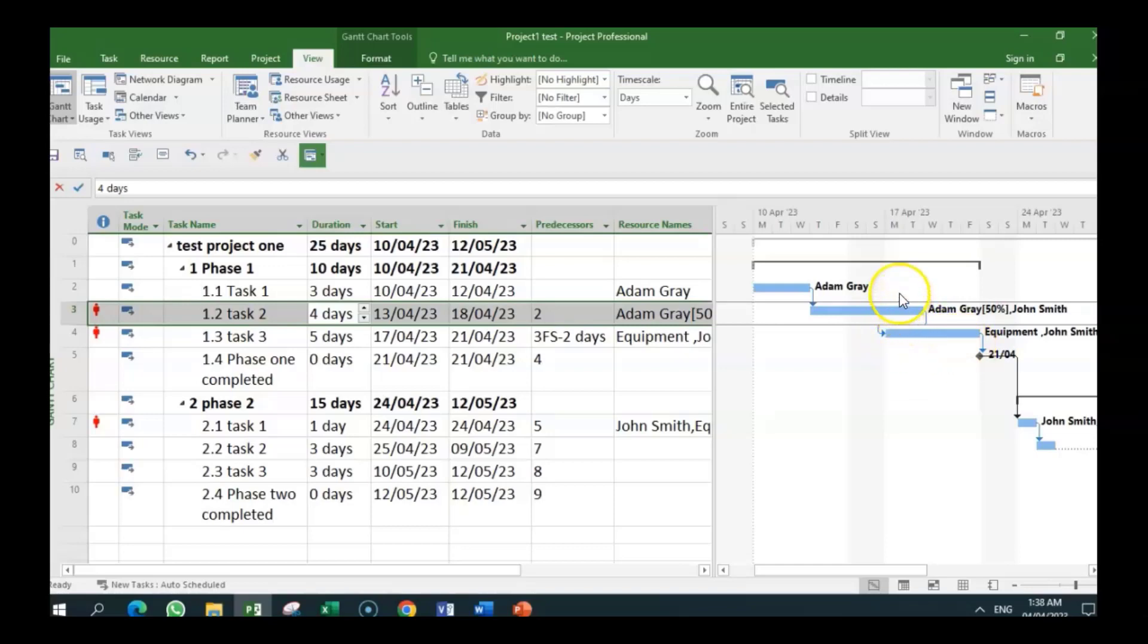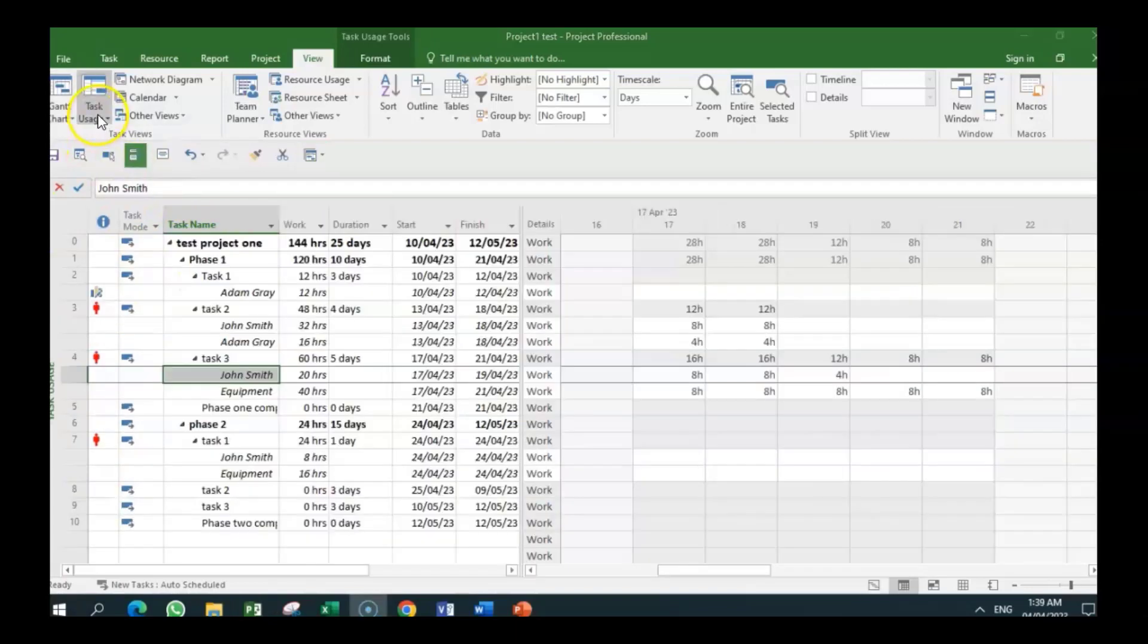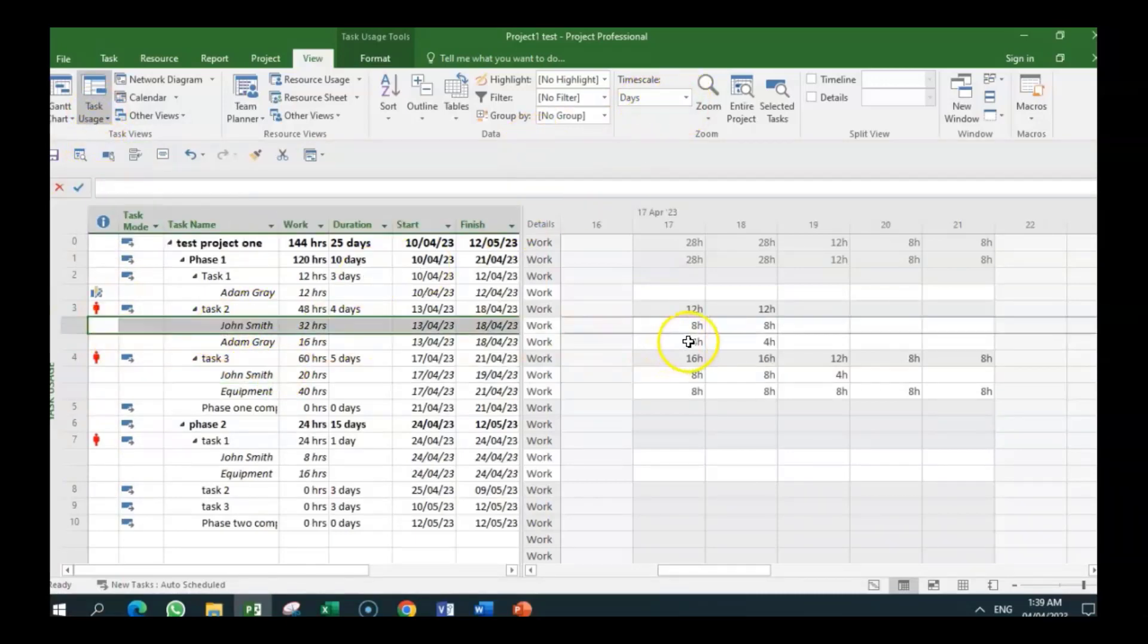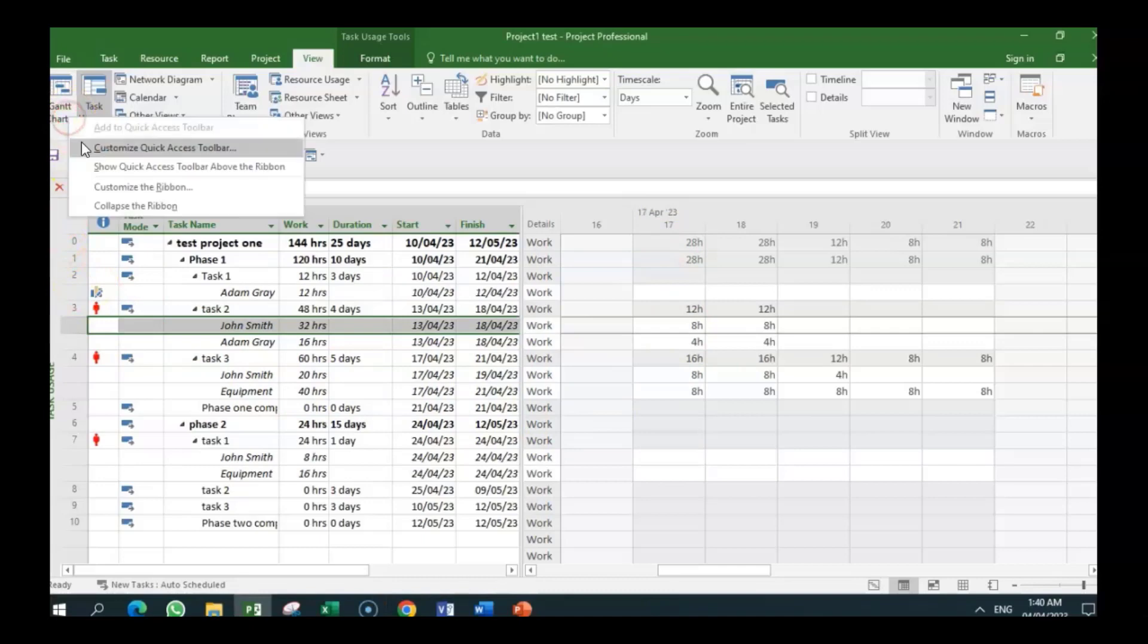But what we have is a finish-to-start with a lead. And because of that lead, it means that in this period, Monday and Tuesday, this person is working on task two and working on task three so that he is over-allocated, which is John Smith. We have John Smith here and we have John Smith here. So let's go into the task usage view to see what is the situation. And I have changed the timescale to days. When we look at John Smith, we realize he's working on task two on the 17th and he's working on task three on the 17th.